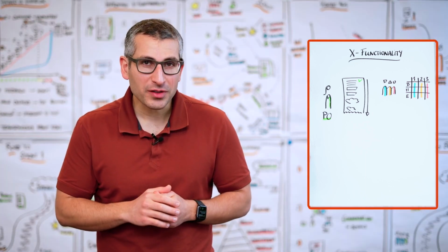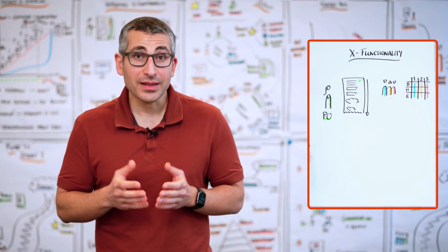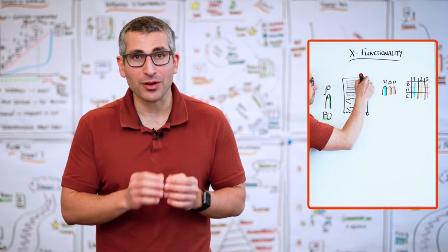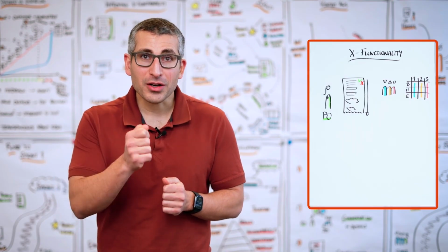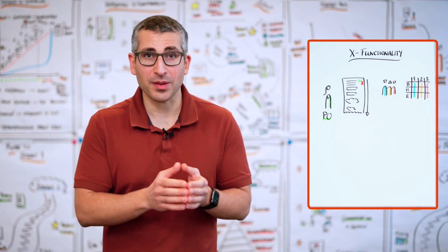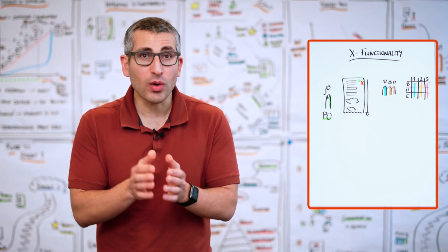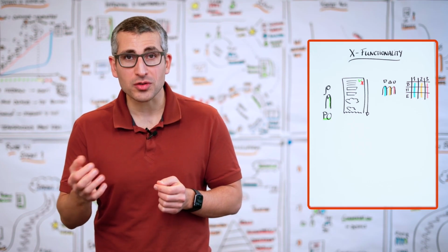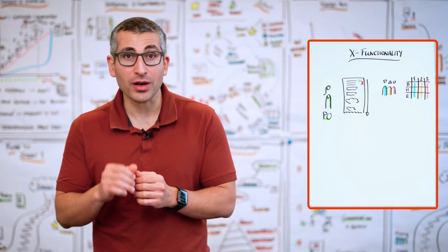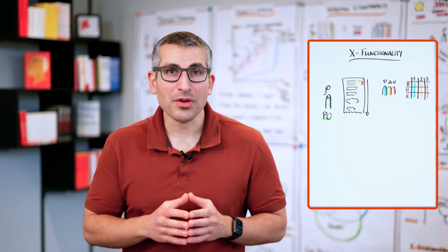Now that you've spent a bit of time thinking about this, most likely you've come up with a suggestion that, yeah, item number 2 cannot be moved from the product backlog into the sprint backlog because our orange person cannot deliver 140% of their capacity, and none of the others has the skill set to do whatever the orange person was supposed to do. So item number 2 does not move into our sprint backlog and remains in the product backlog. Now we move on to item number 3.